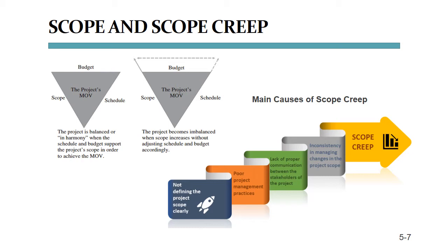On the other hand, of course, it means that we are going to introduce a risk to our budget management and to our schedule management. So the only correct answer to this is that, sure, we can build you XYZ while we're building ABC, but we're going to first have to evaluate the impact on our budget and on our schedule. And then we're going to put together a change request in order to adjust our scope so that we can ask for any extra funding or for any extra schedule that it will take to complete the project on time.